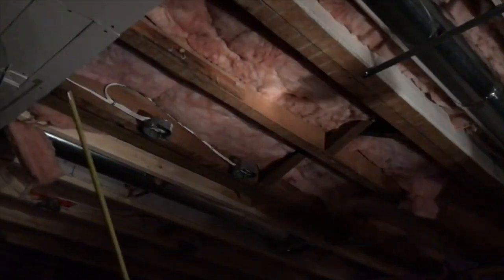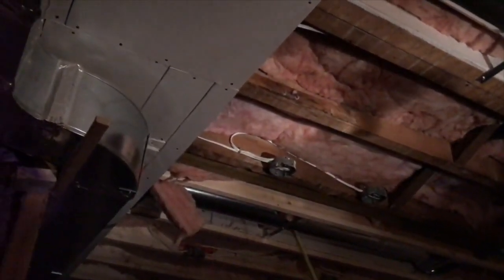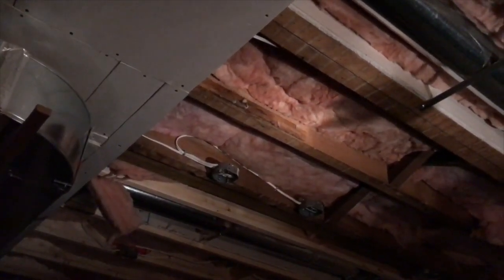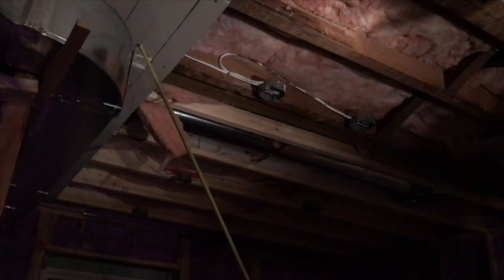So what this is, I'm going to give you a trick, guys, about how to make triplexes. I'm going to save you hundreds of dollars. When you design the triplex and you go through with the heating guy and the architect, you decide that it's going to be ductwork right here. A good idea is to take this 5/8 drywall and put a sheet up against the wall that comes out 4 feet this way. I'm talking after all of the subtrades have been through and put their pipes. And take a sheet and come down this way before this guy goes in. Look at how difficult it is to cut all around there.